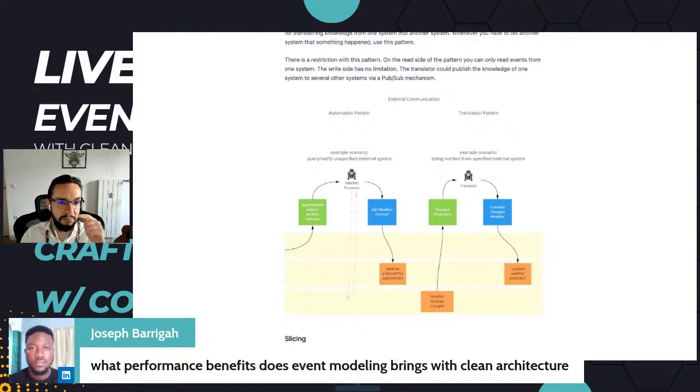Well, it allows you to plan your project so that you determine what the vertical slices of your architecture will be, so that if you have a big domain, a big application layer, and a bunch of infrastructural concerns, in the same sense as vertical slice architecture, you model by just diagramming the life cycle of the project as you would with estimations or with Jira. You just create a roadmap for the project following how the data evolves, and you get vertical slices.